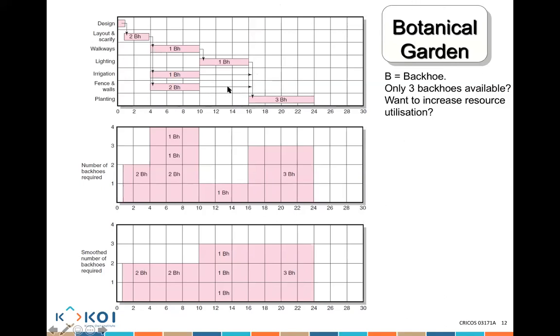How many days slack do I have here? 10, 11, 12, 13, 14, 15, 16. Okay, so this is 10 to 11, 11 to 12, 12 to 13, 13 to 14, 14 to 15, 15 to 16, 6 days. Here, the activity requires 4 to 5, 5 to 6, 6 to 7, 7 to 8, 8 to 9, 9 to 10, 6 days. So if I was to push this activity for 6 days to start in day 10, do I have any more slack left?